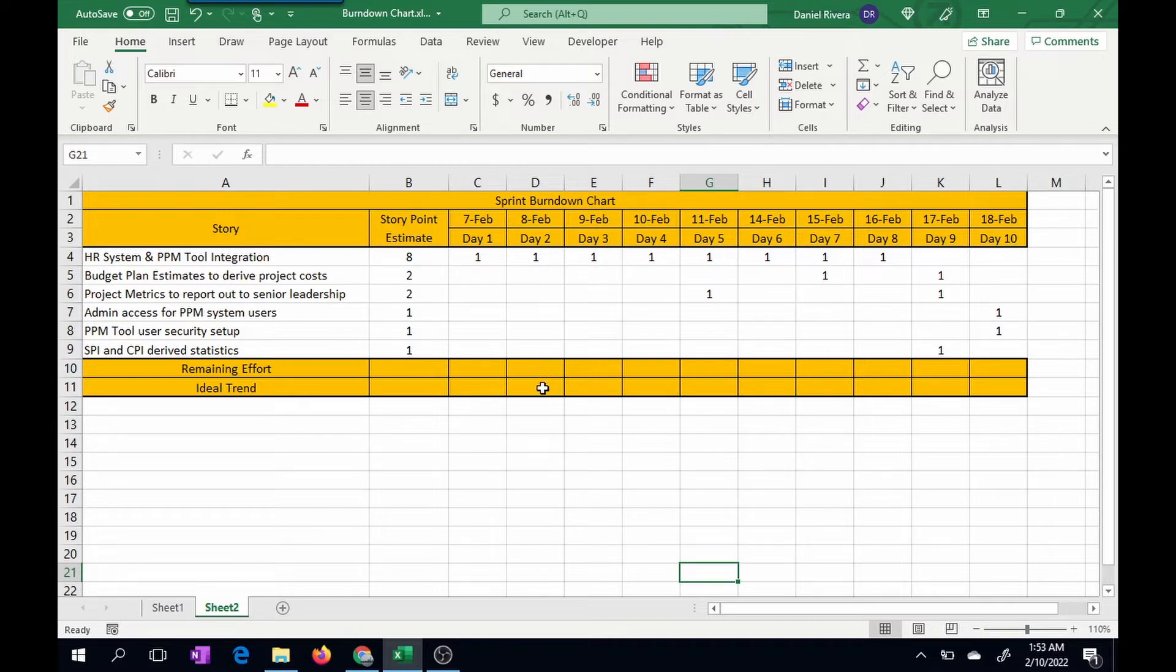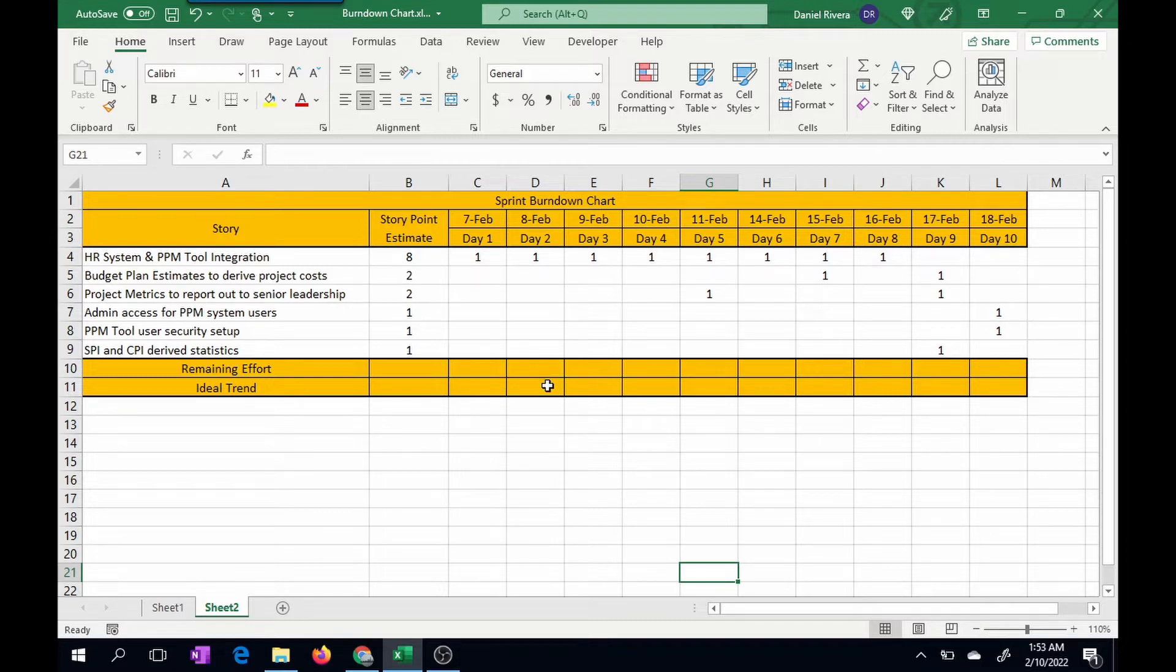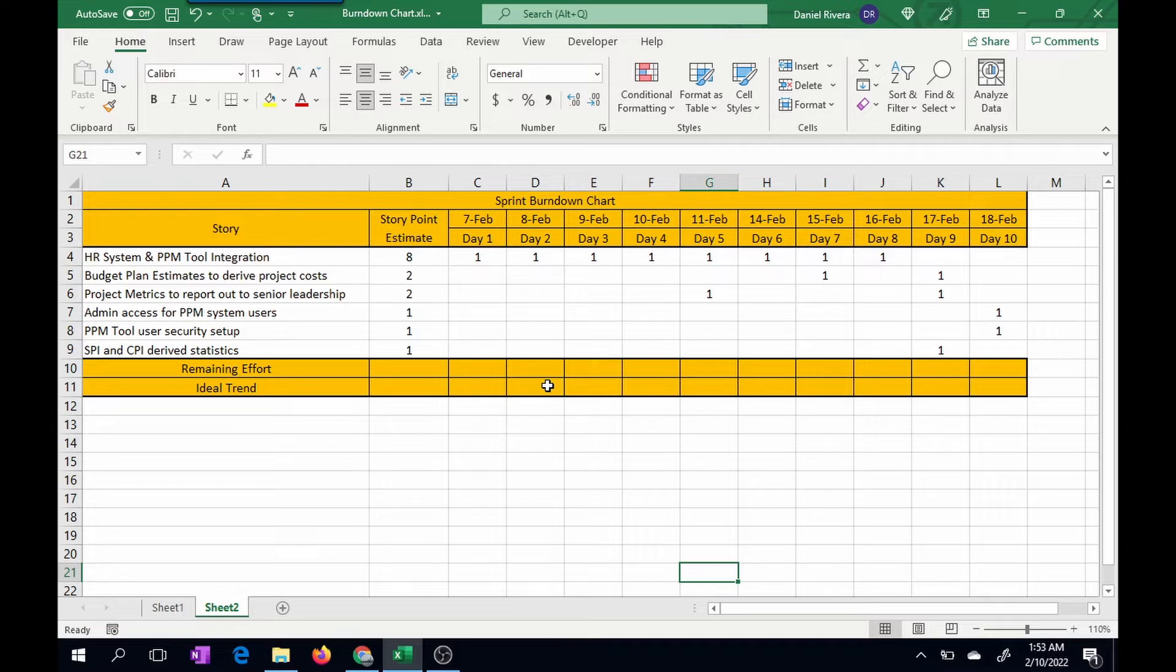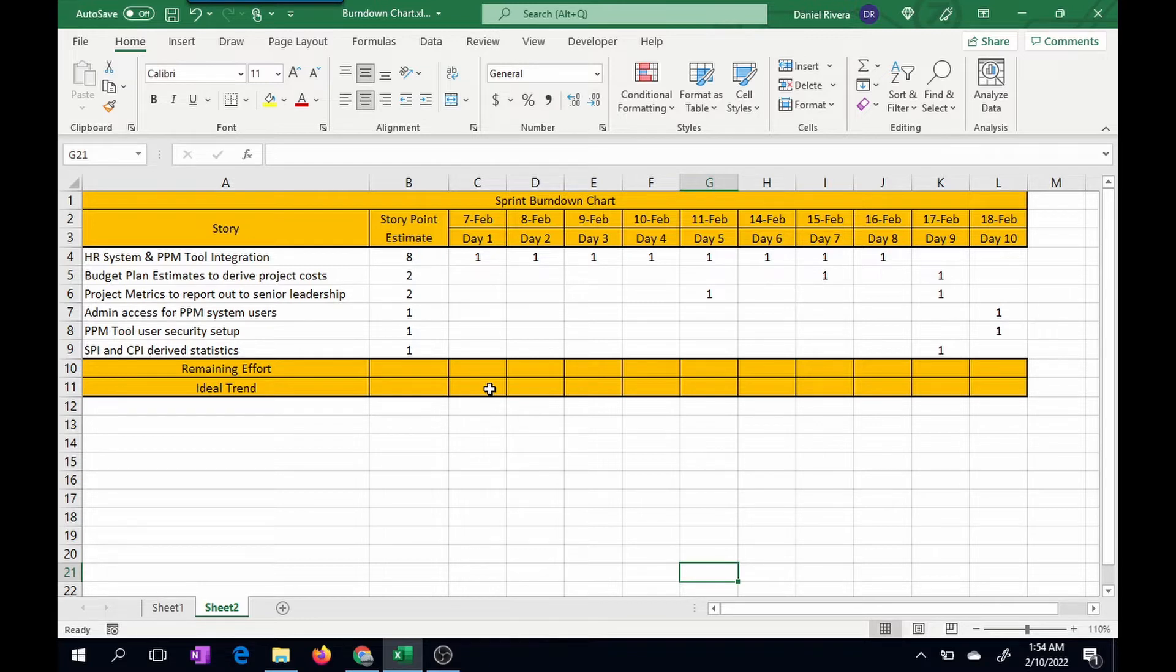So you're going to have to catch up. And vice versa, if it's under the actual ideal trend, that means you're trending ahead of schedule. When you trend ahead of schedule, maybe you didn't estimate enough story points for that sprint and you can add more. So with that, let's get started on the formulas.